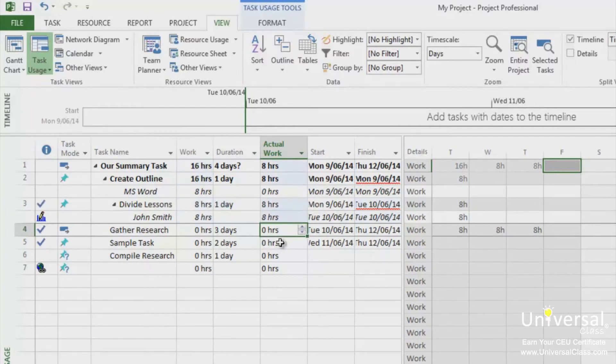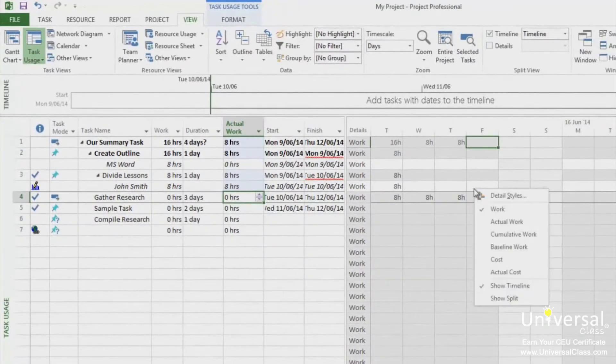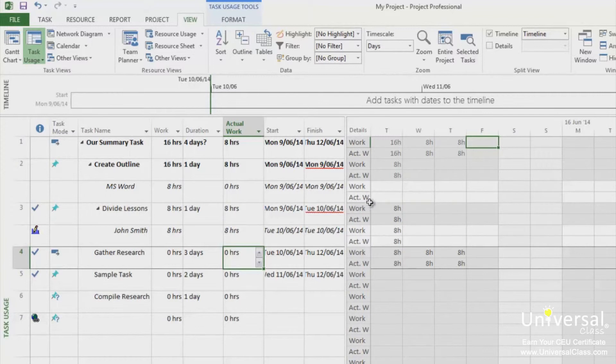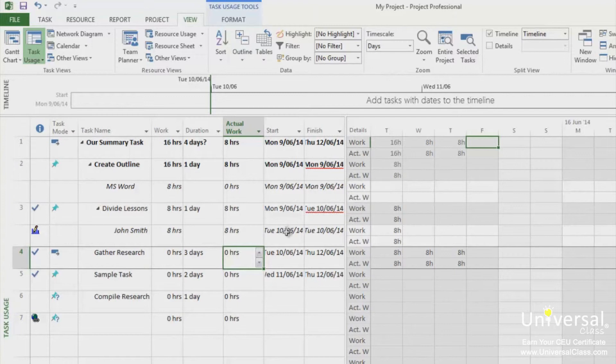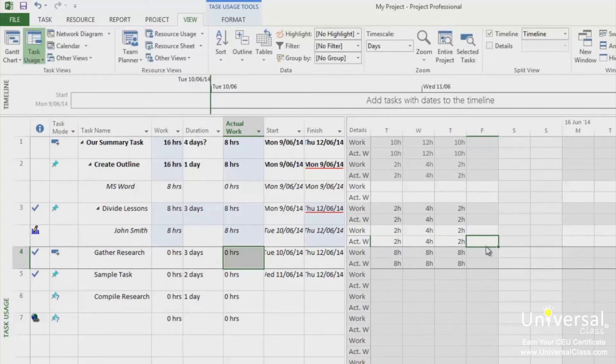To enter in the hours on the task for each day, right-click in the chart pane on the right side of the window. Choose Actual Work. The row called Actual Work will be displayed. This is called ActW. Click on the Actual Work cell for the day in which the resource worked and then enter a number. Next, repeat that step for every day the resource worked on the particular task.